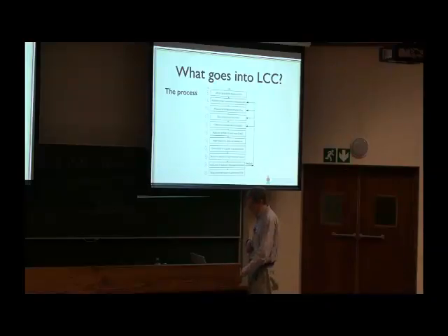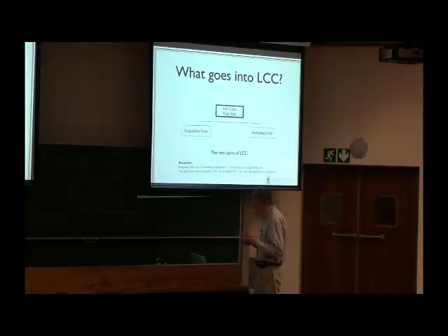The other thing that one must understand, you will see in point two, it says alternatives and acquisition and sustaining costs. Now, we show that there are these two costs, acquisition costs and sustaining costs, the two parts of life cycle costs. Remember, below, frequently the cost of sustaining equipment is 2 to 20 times the acquisition cost. So one has to take both into account. It's often cited, the rule of thumb is 65% of total life cycle cost is set when the equipment is specified.